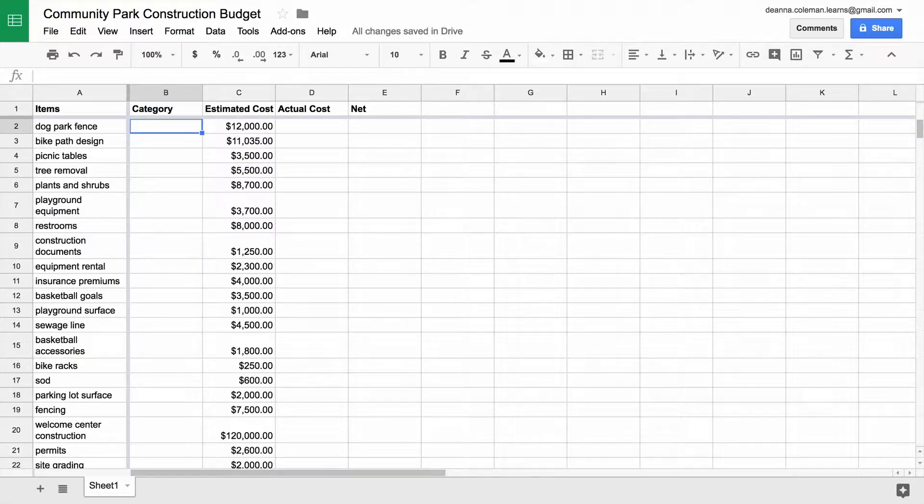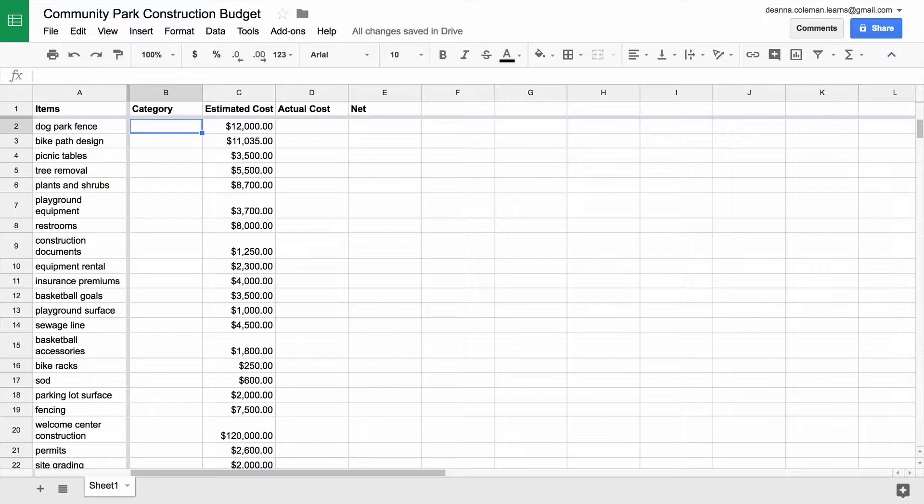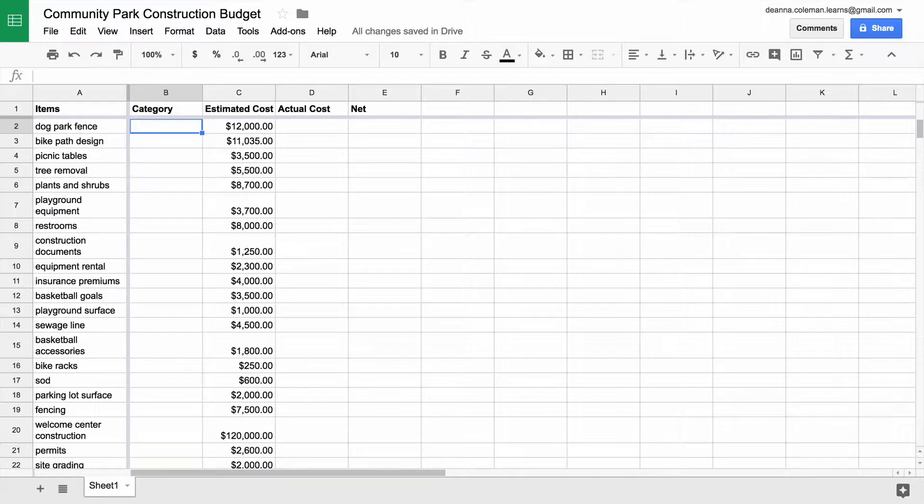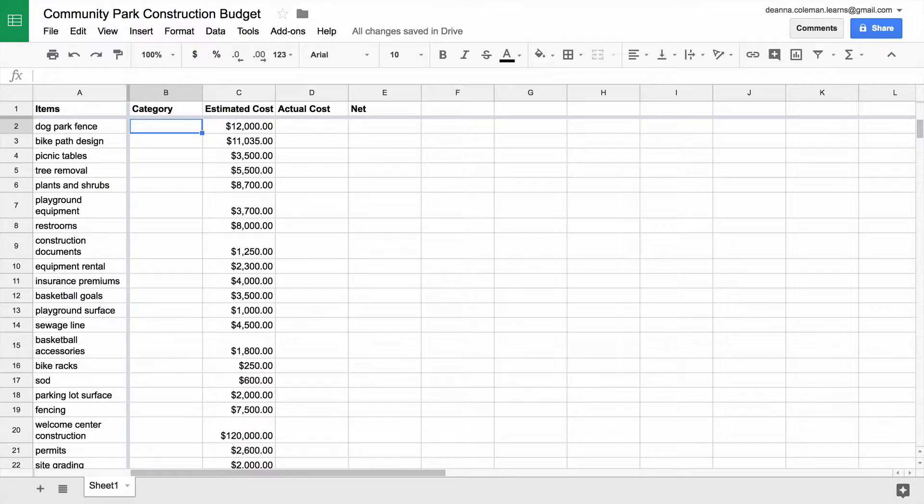To make categorizing expenses easy and quick, use Data Validation to create a drop-down menu of categories to choose from, right in your budget sheet. Data Validation allows only specific information to appear in cells. This prevents typos and inconsistencies in the category names. It also gives project collaborators an easy way to classify new expenses.